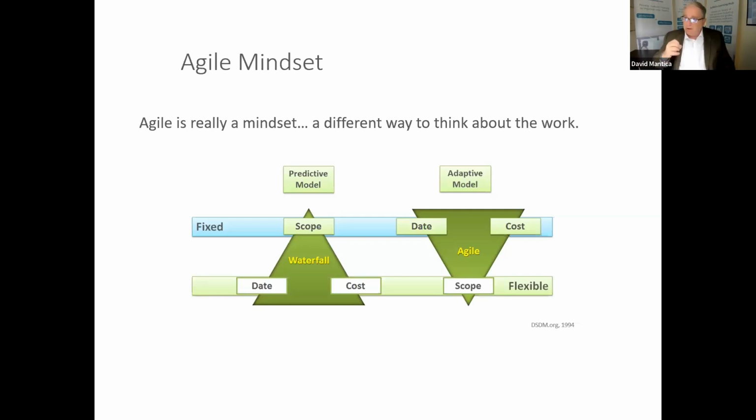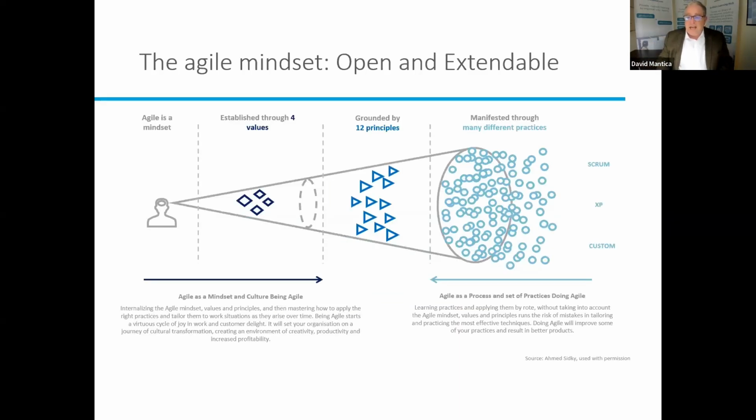When you do that, you create a time box where your date and cost are fixed, but your scope is still flexible, because you're going to come out of that time box, reevaluate what you did and what you should be doing, and then plan your next time box going forward with your scope being adjustable. So do you believe that will work?